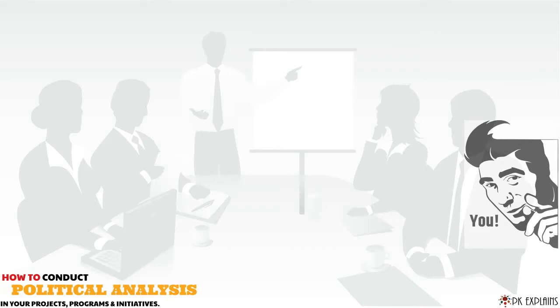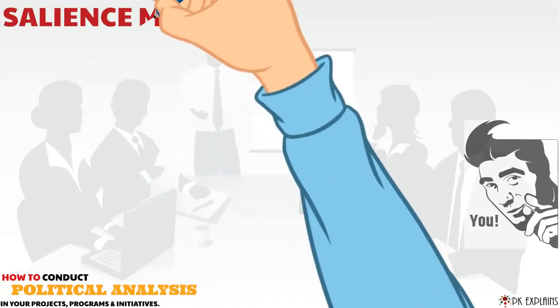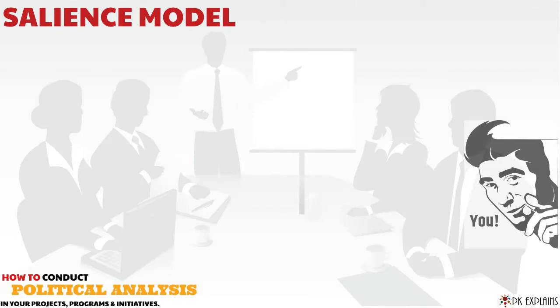Whenever you face difficulties in choosing the right stakeholders and prioritizing their competing needs, think about deploying another tool from your toolbox, the Salience Model. Let's talk about how this tool can help you to sort it out. How it brings clarity about their prominence and importance. It is a method for classifying stakeholders and establishing clarity about who matters for you. Salience is the quality of being particularly noticeable or important. The prominence in the organization.